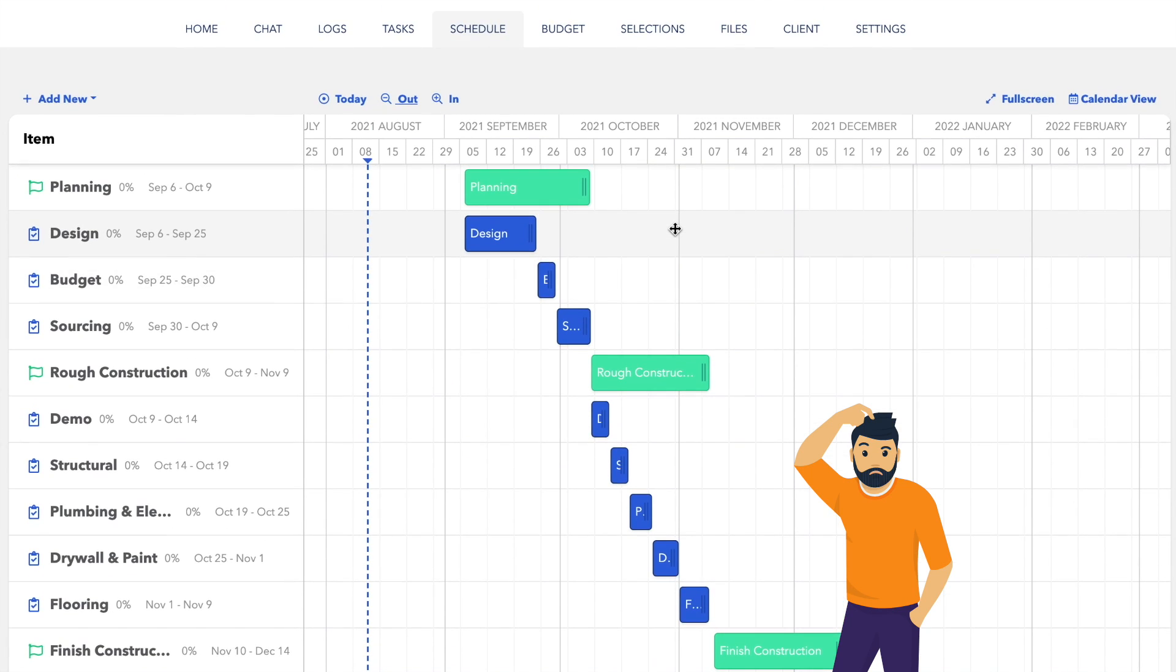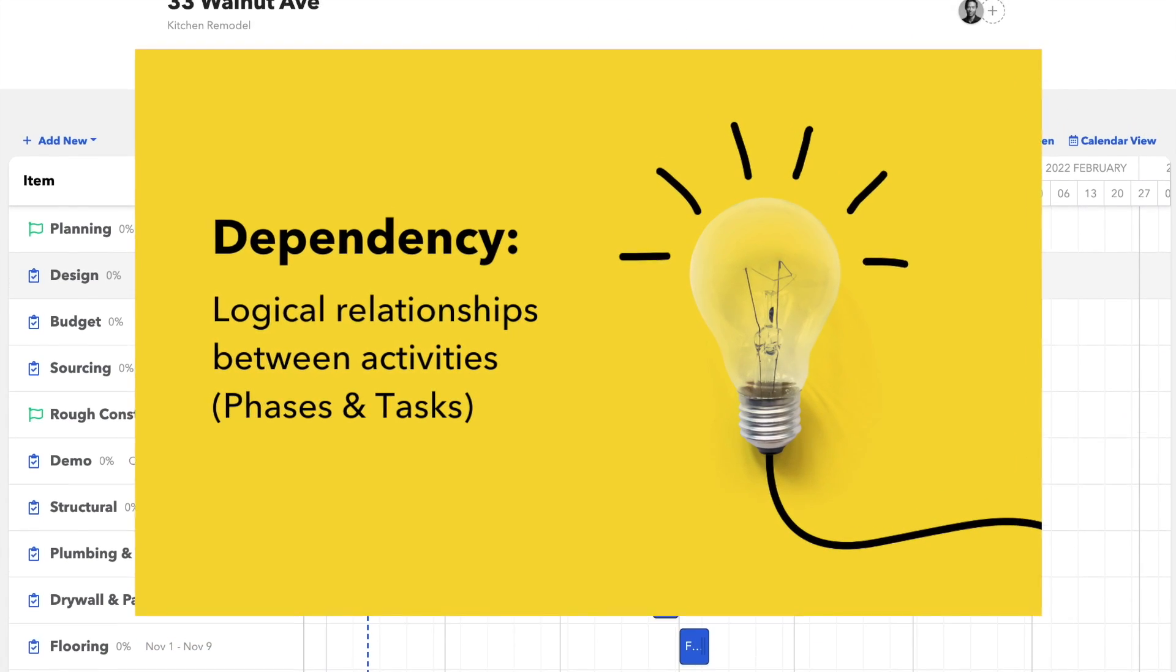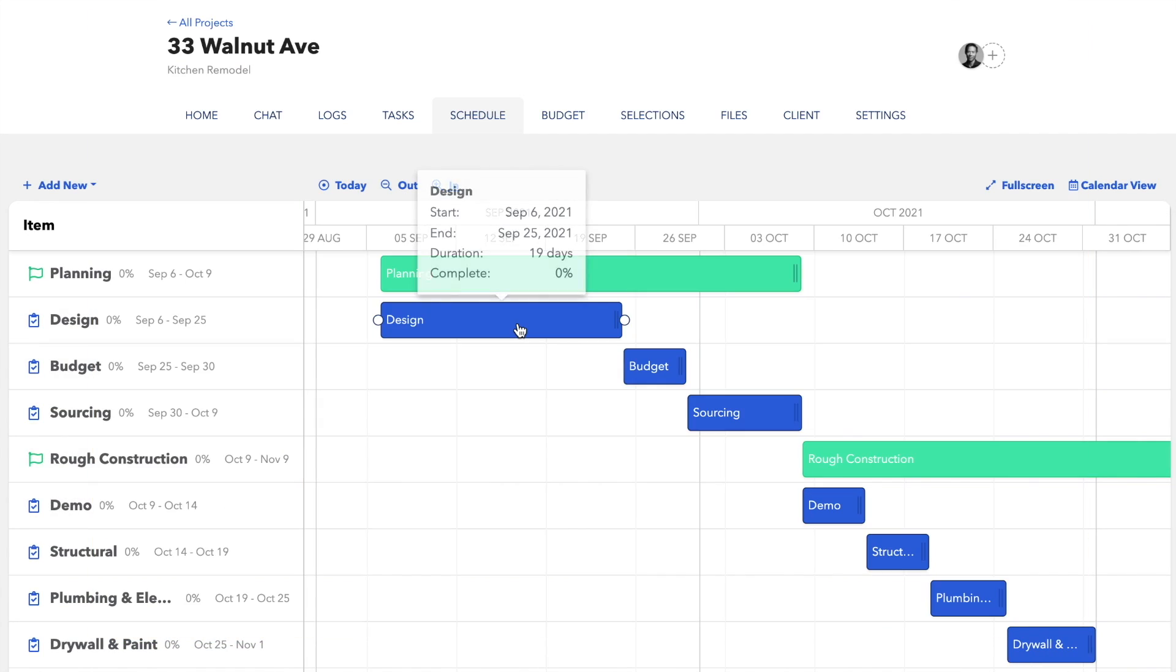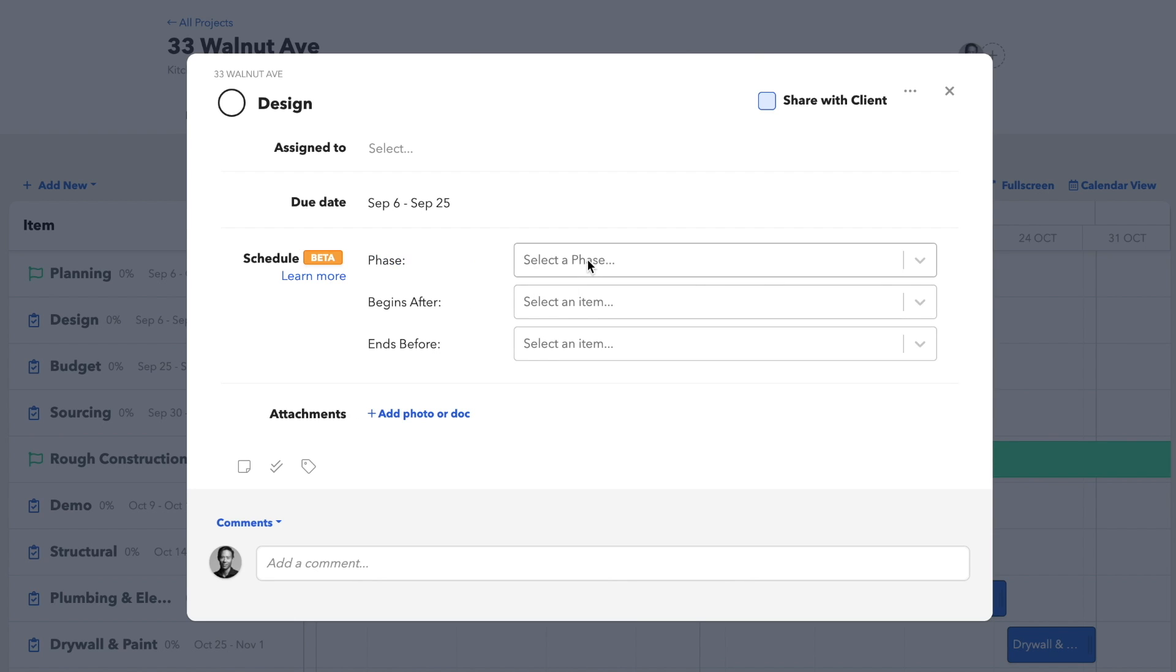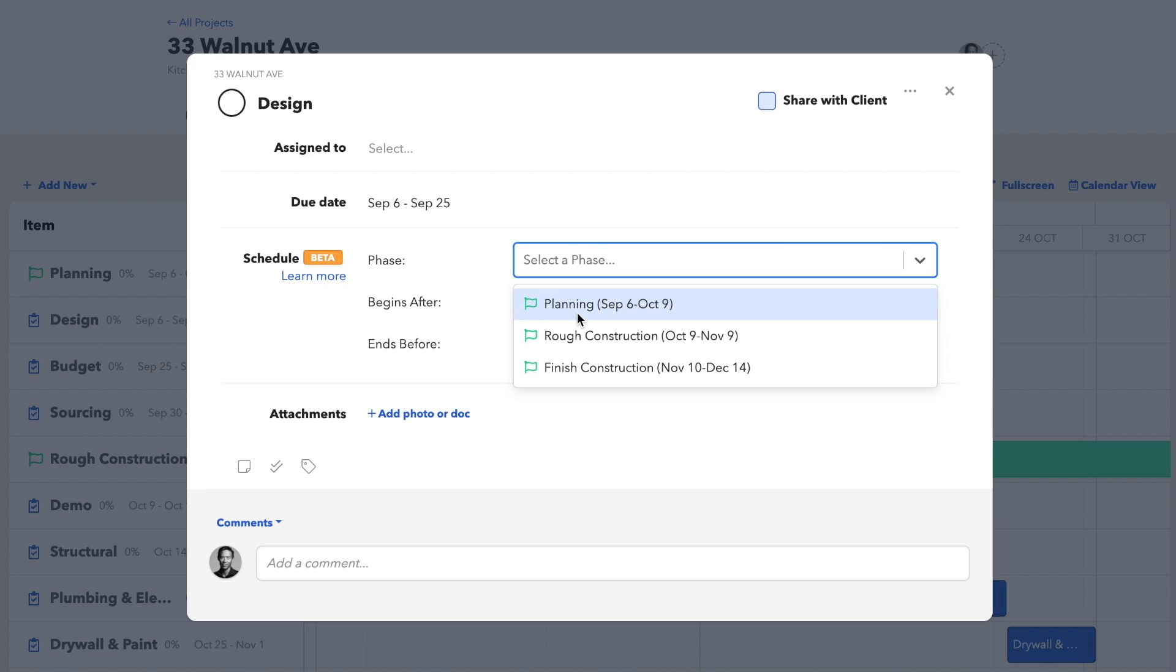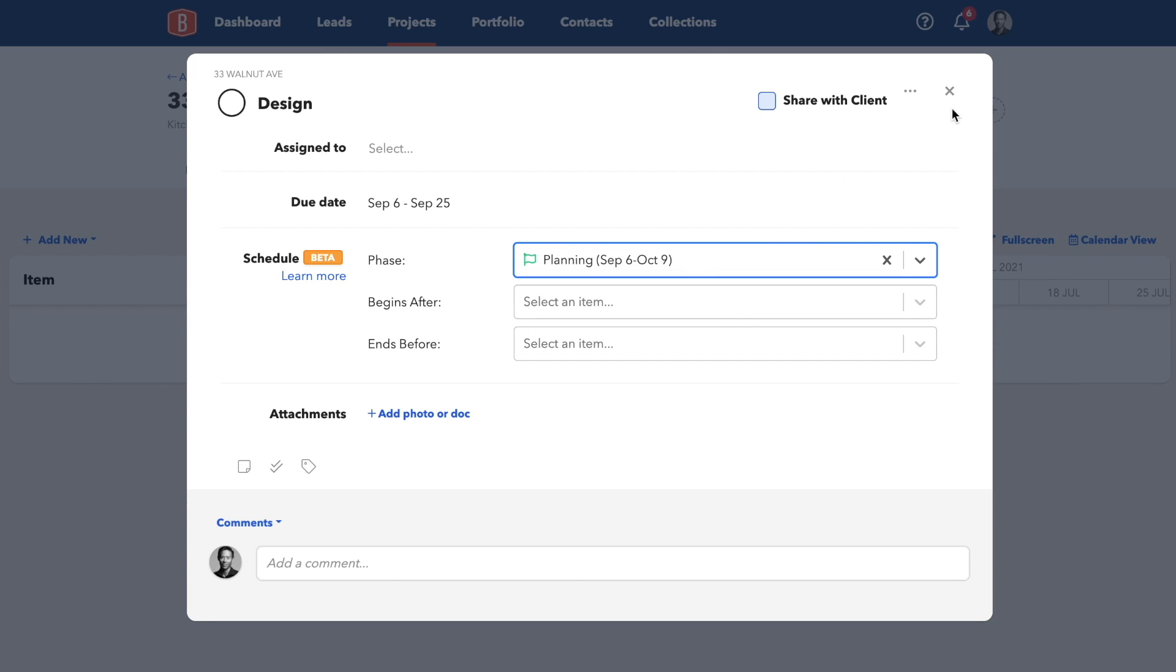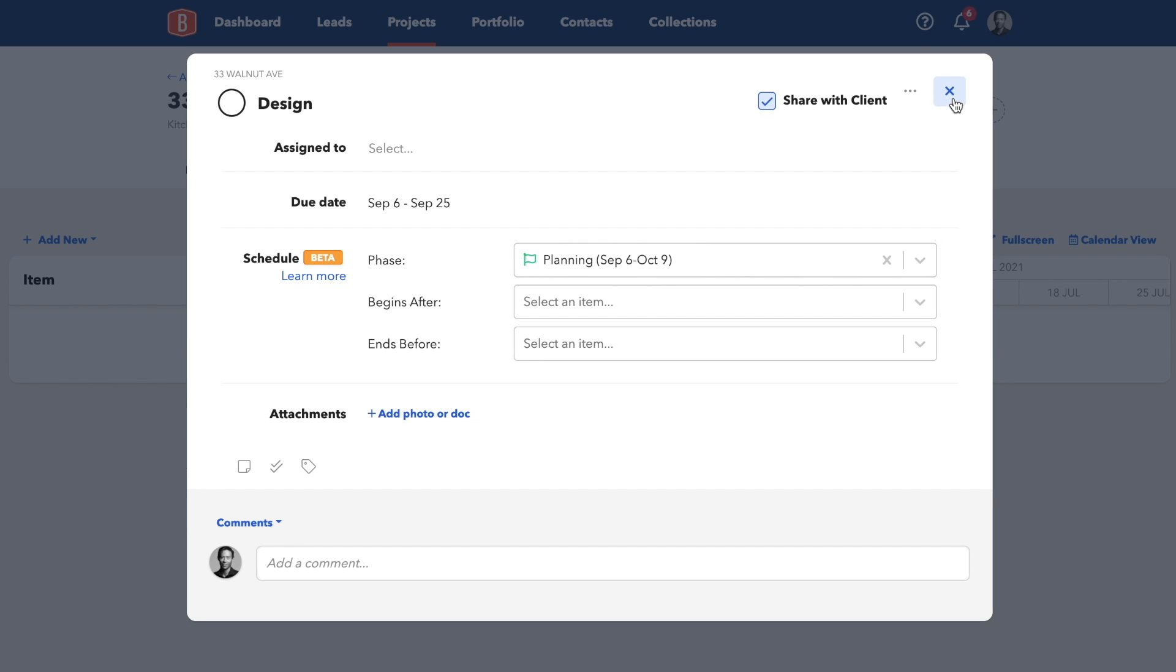Well, it's time to add what we call dependencies. So what we'll do now is officially link our tasks to our phases, which you can also do while creating them, but just to layer on one feature at a time, I'm adding them separately.